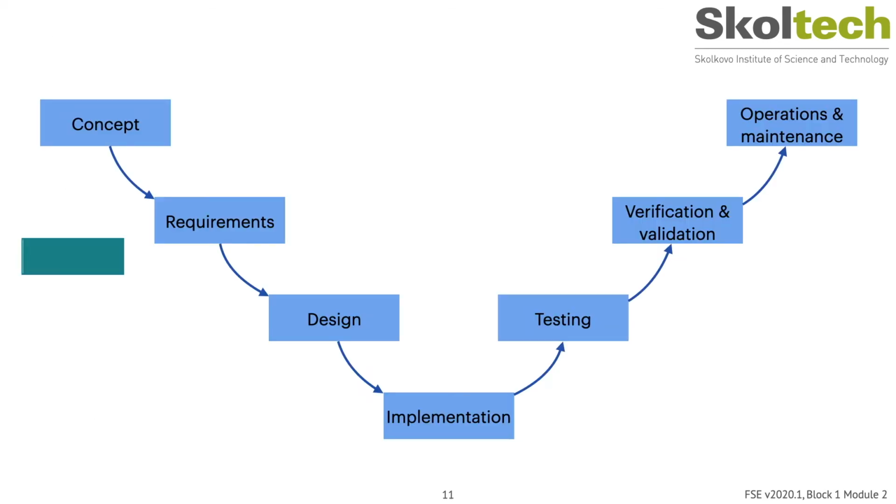The V model is basically a waterfall that's been bent into a V shape, as shown here. So what you could previously do is go from some idea or concept and develop some requirements, and go from design and implementation, to testing, and deployment. But the problem was that typically you only start testing and verifying your system once a significant portion of the system has been developed, and so there's typically a need to test earlier in the process.